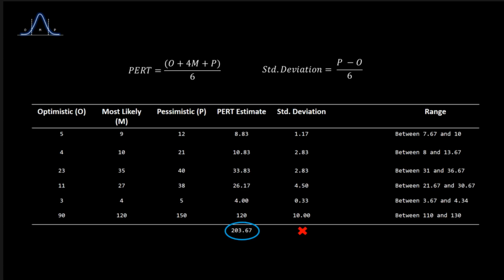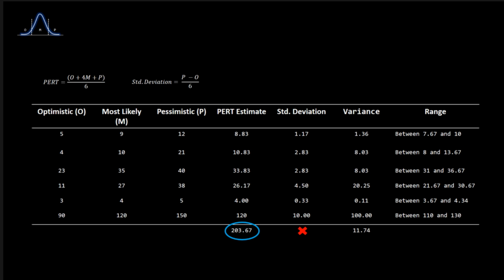However, we can't do the same with the standard deviations. That is not statistically correct. Bear with me for this final step. Another useful concept in probability distributions is variance, which also tells us the dispersion from the center point, but in a way that we can use to calculate the overall deviation. We will calculate one for each standard deviation by using the following formula.